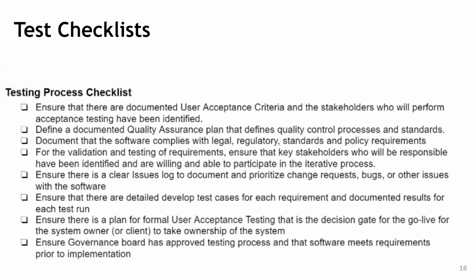And also, when planning, there should be test cases developed to test each use case. So take the requirements that were created during the design phase, and then create test cases to test each requirement, to make sure that at the end of the day, once the development is done, all the requirements that were issued are being met by the system.